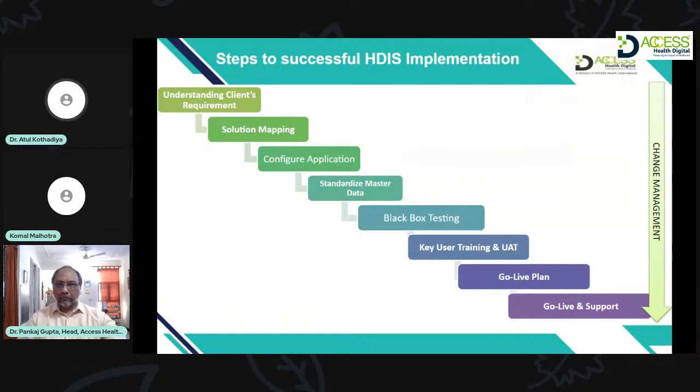During this phase, the test cases are written by the testing team based on the requirements, and they test each test case using the new software. If the output is the expected output, then the feature is passed, or otherwise it is failed. So this stage is also very important before the training starts happening for the end users.